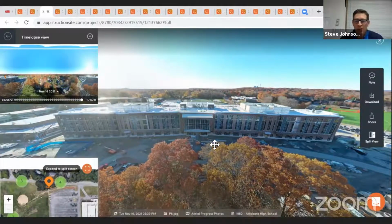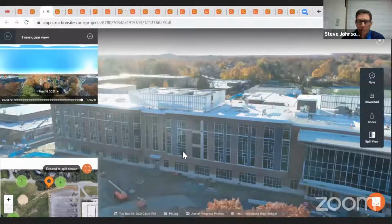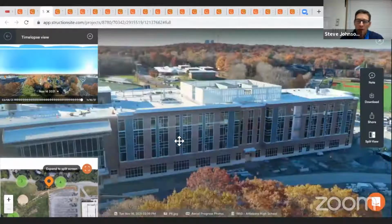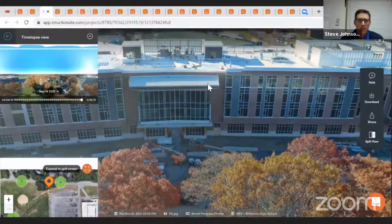We'll start with the north elevation. If we zoom in, we'll see that there's a little more glass installed, and you'll note the loading bays that we used to have here to get materials into the building are gone on building C. So this elevation actually looks pretty good with respect to glass, glazing, trim, metal panels. There's a strip here that needs to be completed, but everything else is in good shape. On the A building side, we still have our loading bays that we need here. Other than that, a lot of this work is complete as well. We're doing a lot of work on this high canopy. It's a lot of tedious work. So if it looks like this hasn't changed in a month, you're not wrong, because a lot of it's underneath here. But we're looking to be able to finish this up, put the GFRG in early next week, and then drop down and do the same thing on the lower canopy here.